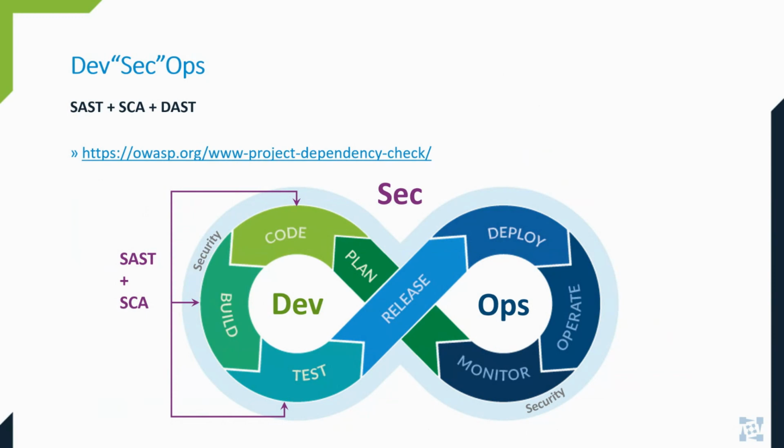And this is an important metric for development managers to always be watching. When a new critical vulnerability is found in a dependency used by your software, that's an event that usually requires immediate action, potentially with consequences that can impact the release plan. So this is information you want to know as soon as possible so that you can set expectations with your product management counterparts.